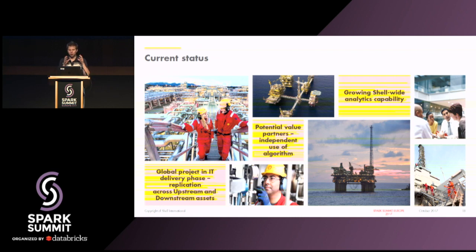What normally happens is we get a problem statement. In this case, we're really strict on the definition of the problem statement. We always say a good problem statement is one step in one process affecting one person. Can you actually identify that core pain point, that user friction that says, I have an issue here? In this case, the inventory analyst was tasked with updating those reorder points, and there was no support for them in doing that. It was left to each inventory analyst with some sort of procedural guidance to say, how do I do that? That was the friction, that was the problem statement.